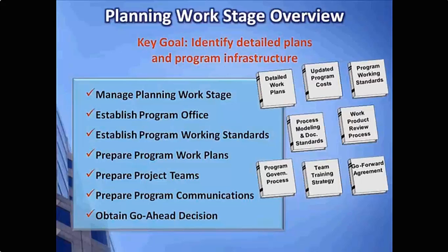Preparing program communications. Remember that we said that this is really a program of organizational change more than an IT project. So to that end, we need to start putting our strategies in place for how we're going to communicate with our different stakeholders, what communication events may take place that are needed, such as training, or maybe we use softer means such as brown bags, lunch and learns, maybe a newsletter at the company, but preparing those program communications and a strategy for how we're going to pull all that together. Again, that's not a small task, but doing that would happen here in the planning stage.